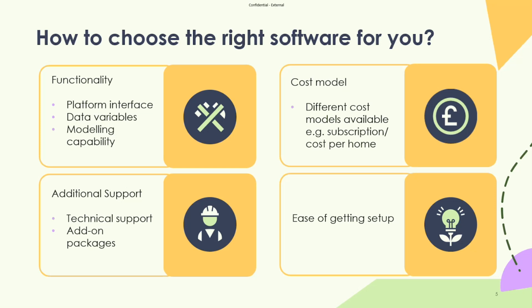So once you've spoken to the different software provider, it's then understanding how they can turn your current format into the format they need, and then for them to clean that data and fill in any gaps or clone data where needed. So that can take a significant amount of time, anything from 6 to 8 weeks, if not longer. So it's really good to think about that now, if that's something you've not got software systems in place or you're looking to get software in place.